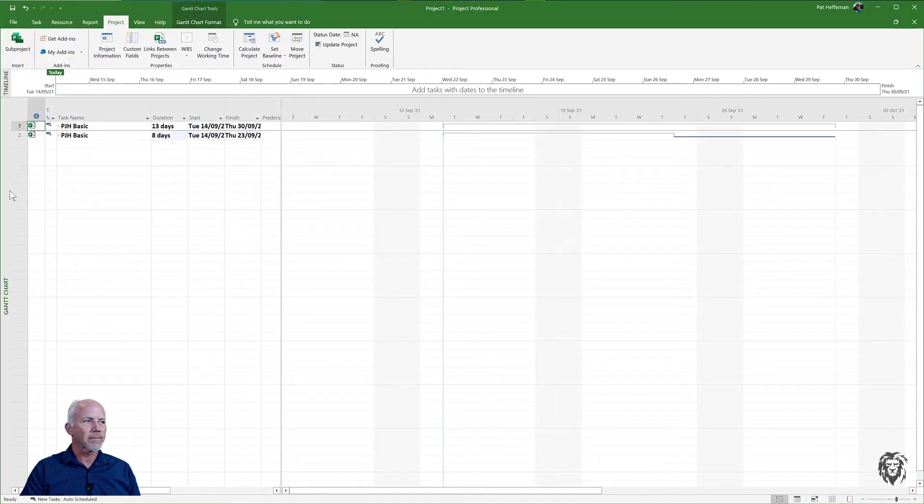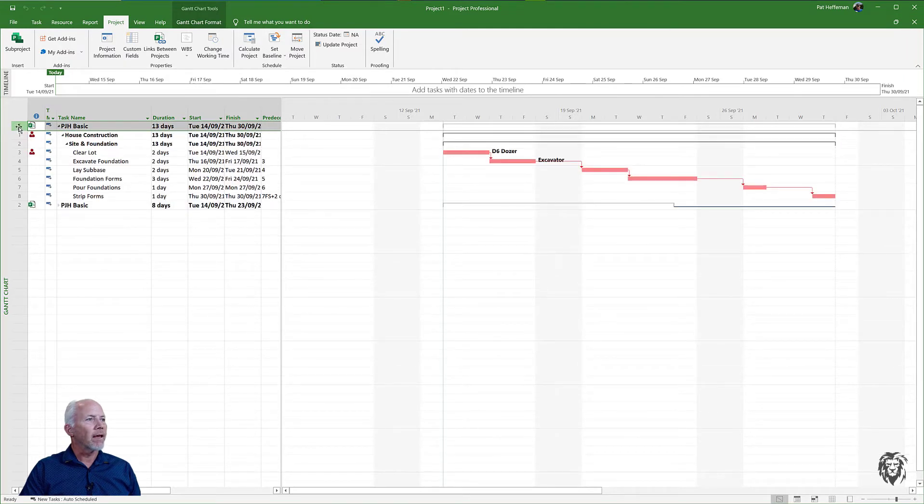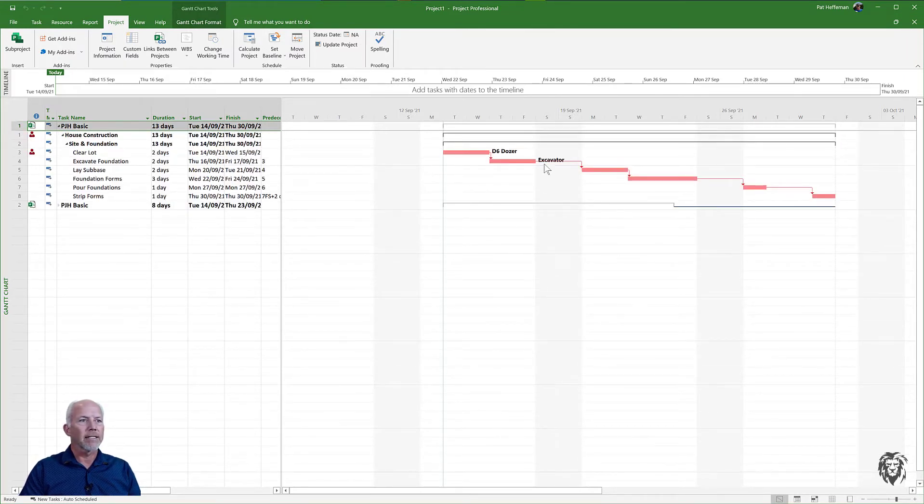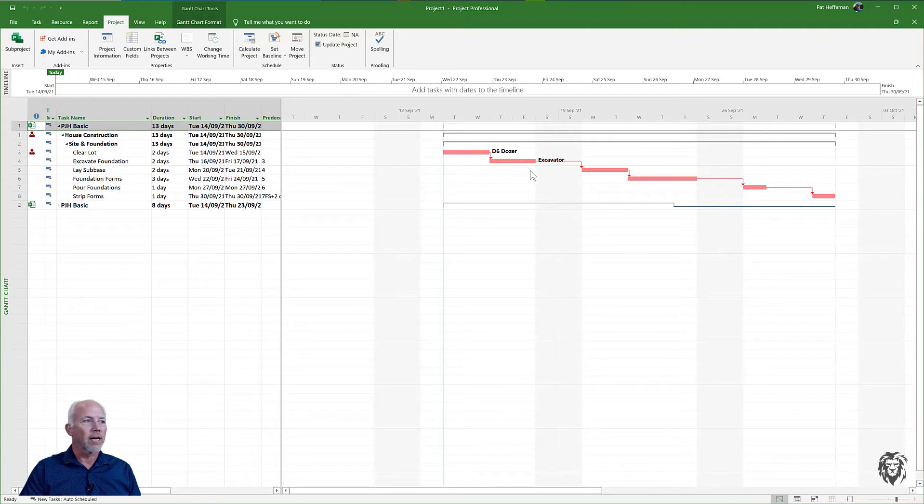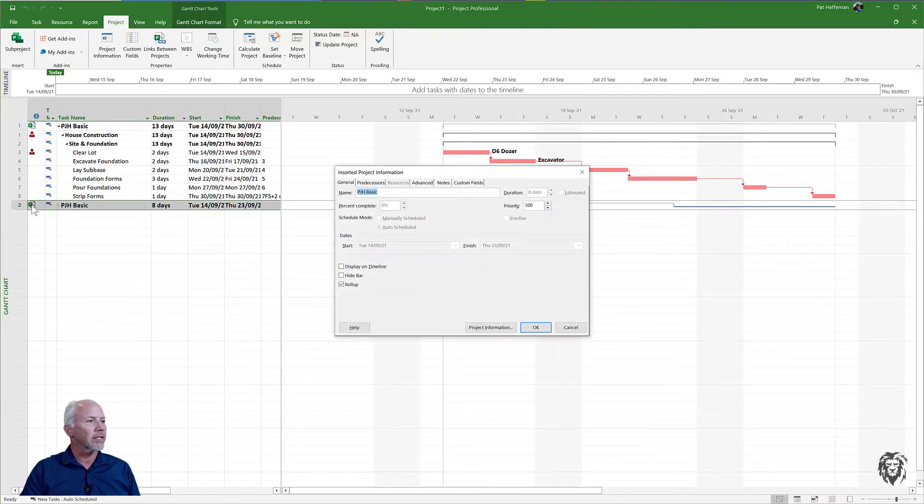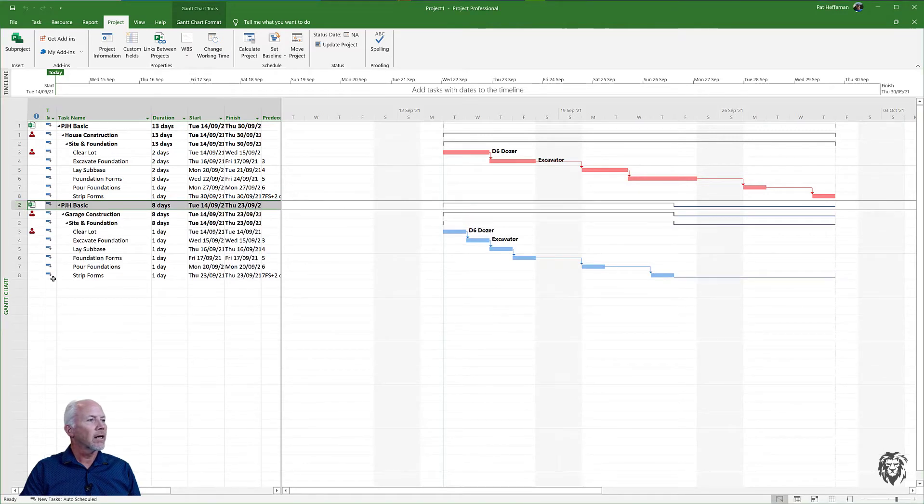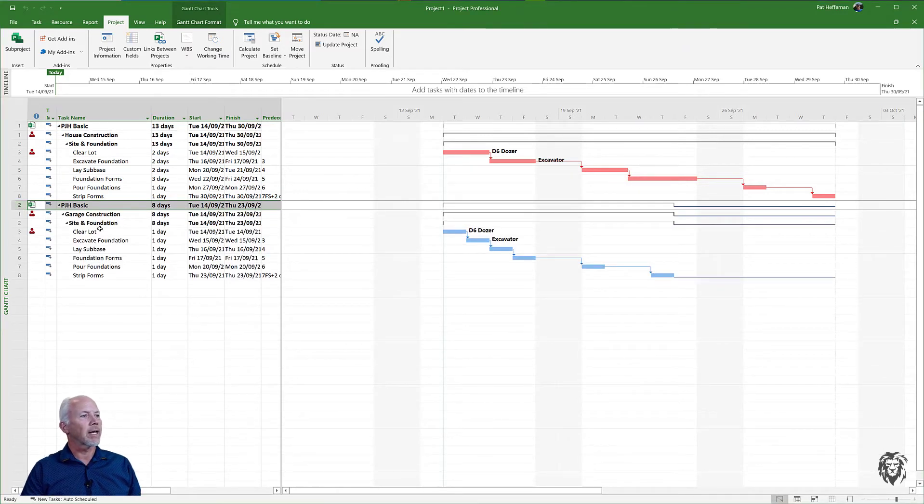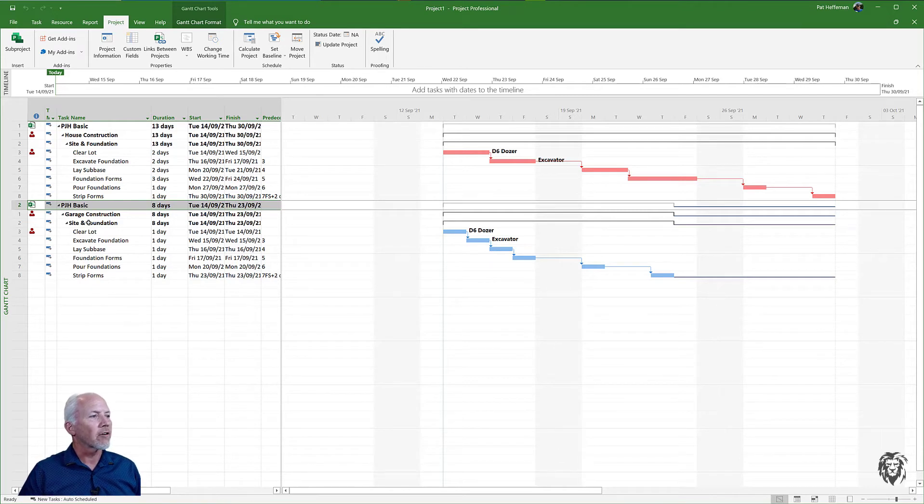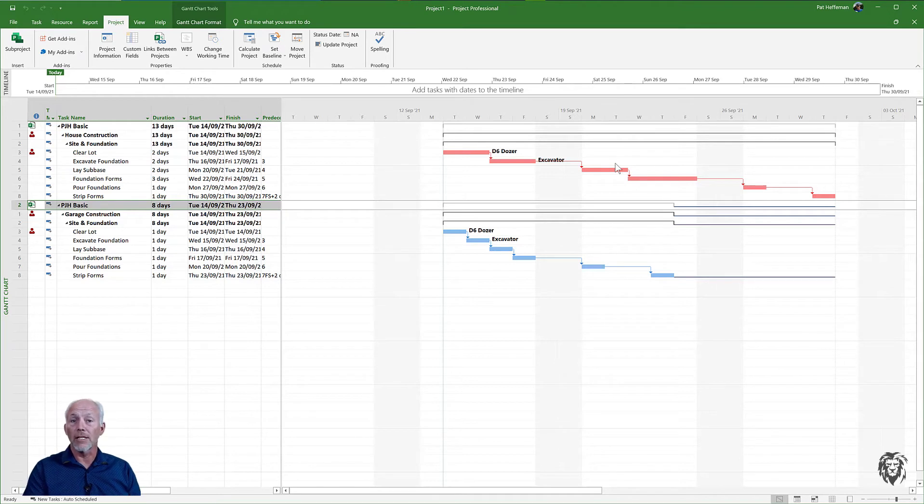Now if you double-click on it, it will open up with all of its tasks and everything else. You can see the resources are assigned to it. I can see my two projects together on the same screen. If I double-click here, I'll open up my second project, and so we have the garage construction loaded down here.